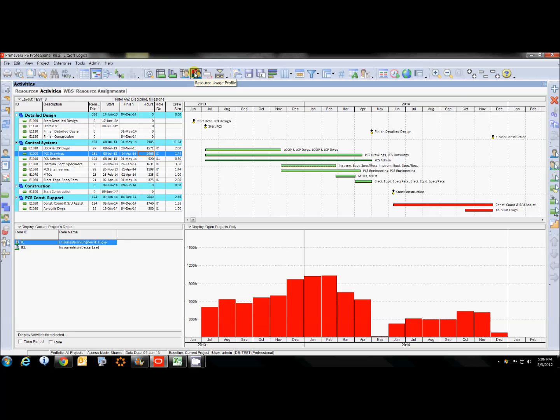And we might decide that we can't have that particular lump there in the middle starting about December, and so we could adjust that. But right now, this is what I'm going with. And what I would probably do is take the equipment specs right now with 3 guys and move that out a bit just to level it.